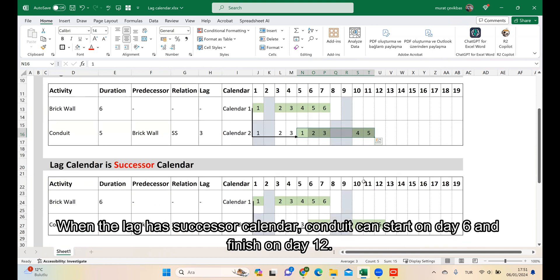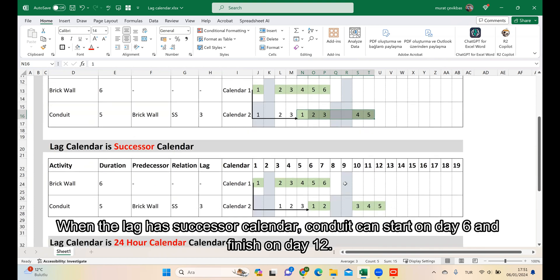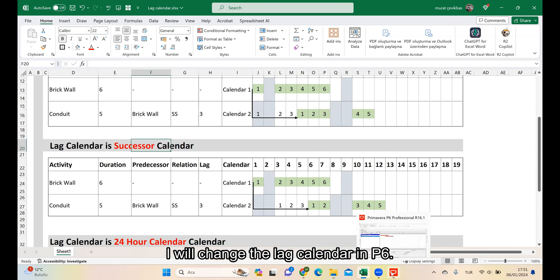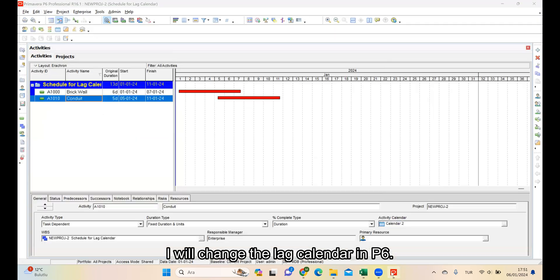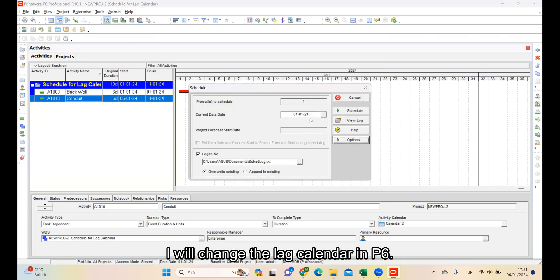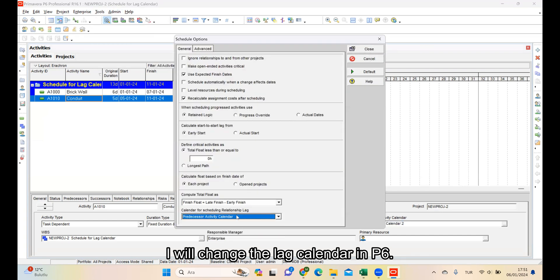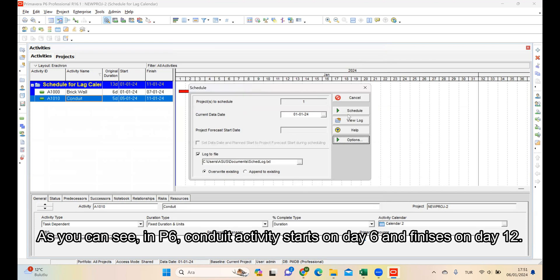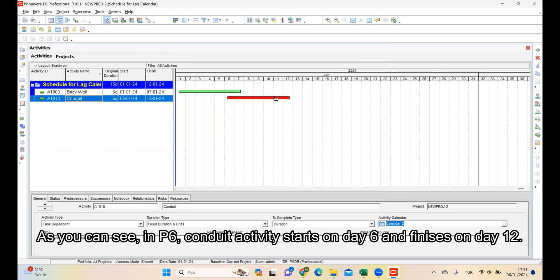When the lag has Successor calendar, Conduit can start on day 6 and finish on day 12. I will change the calendar in P6. As you can see, in P6, Conduit activity starts on day 6 and finishes on day 12.